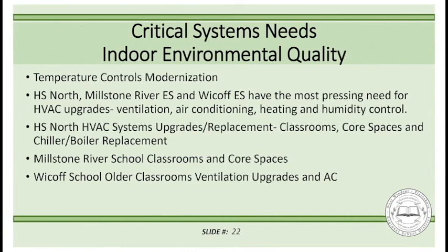So if the project is $10 million, the state pays $4 million of that project in the form of debt service aid over the period of the bond, which is 20 years, usually, okay? Also, HVAC system upgrades in the classrooms. When we're talking about classroom upgrades, air quality, ventilation improvements, dehumidification, as well as chillers and boilers at High School North, systems are simply beyond their useful life. The building's 20 years old almost.